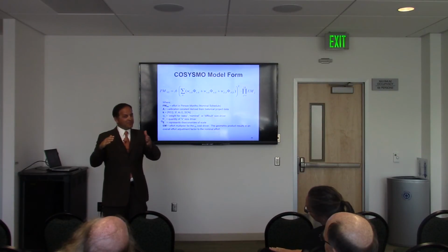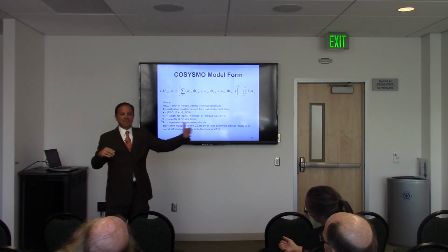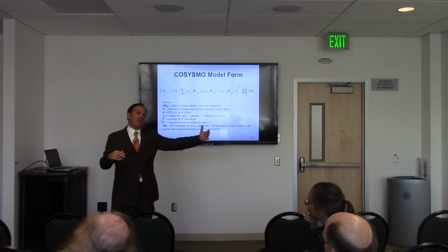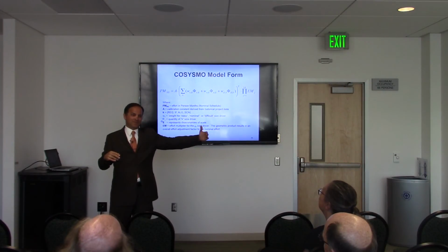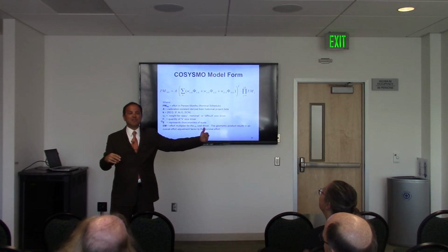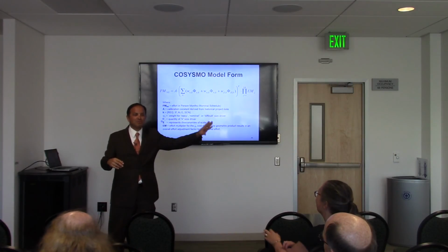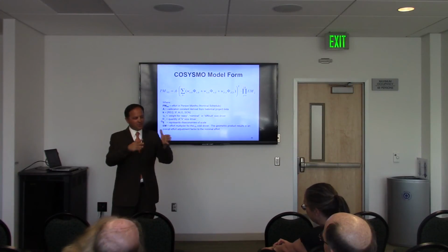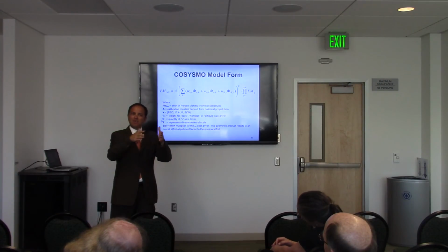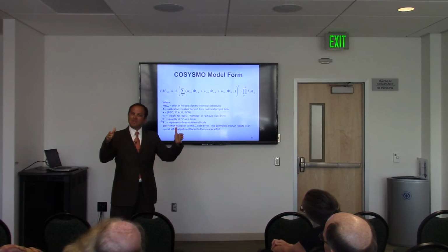And there's a spectrum of contract vehicles. The other end of the spectrum from firm fixed price is cost reimbursable. Who carries the burden on that? The person paying the bill. Because all you do is bill them for your time, right? So there's a bunch of flavors in between those. So that determines whether you should pad your estimate or not.